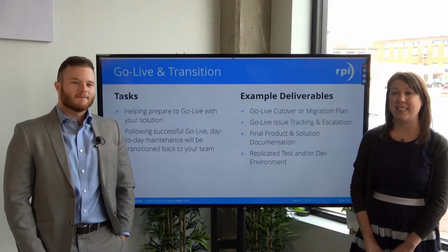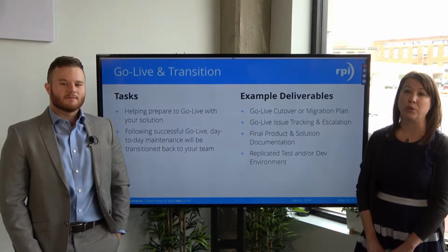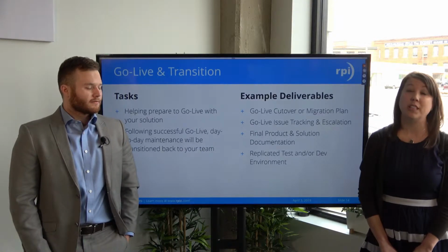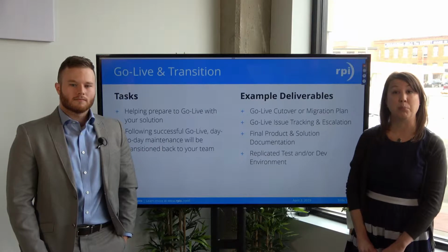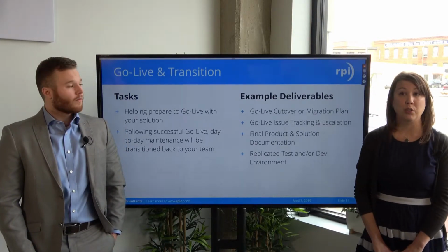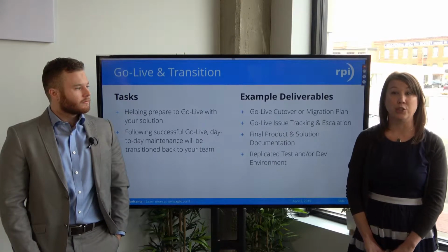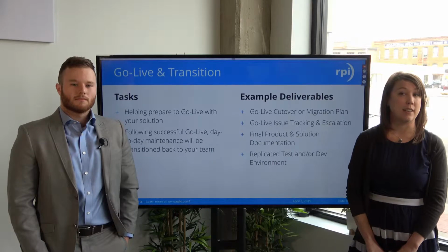After we've agreed and signed our user acceptance testing template, we're going to create a cutover plan with roles from each team and their responsibilities. We're going to update training documentation as we need to, depending on if there were any changes made during the design or implementation phase. After go live, we're going to have 2 weeks of support as you settle into your new system. We're going to ensure that your new production environment is copied back to your test, dev, or both.